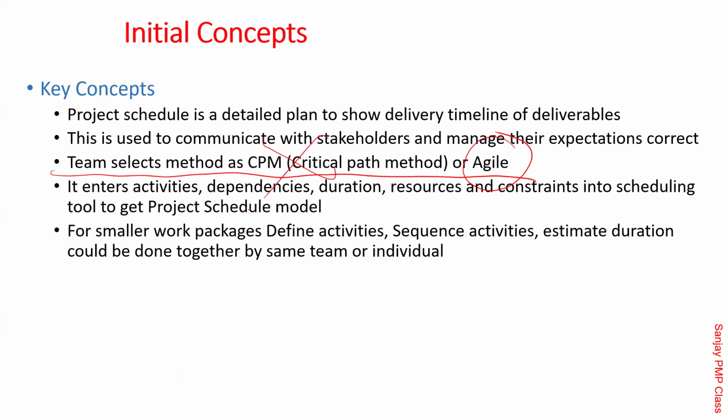You can't go ahead and establish a data center in the agile method. What does it mean, Pawan? It doesn't work that in the morning the project manager comes and says, let us do a Windows server, and tomorrow he comes and says no, let's do a Linux server. The whole thing will have to be planned. You'll have to give the order, then installation, commissioning, and all that. So there is no other way than to continue with the critical path. It's a dream situation to say that the whole world is moving quickly towards agile; that is the reality.